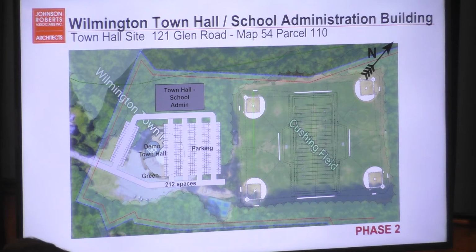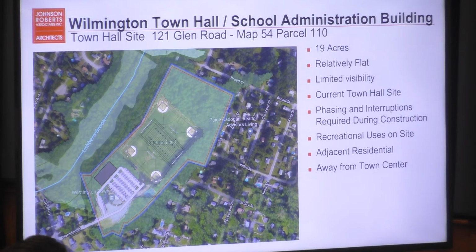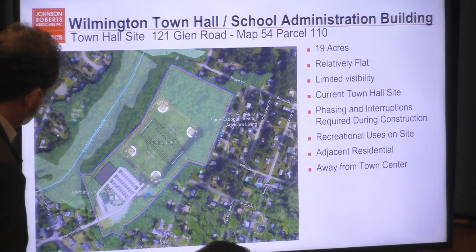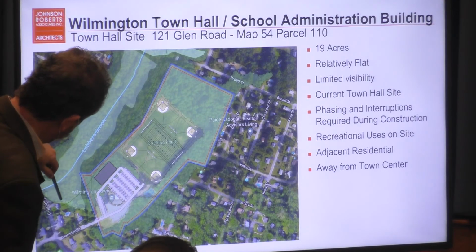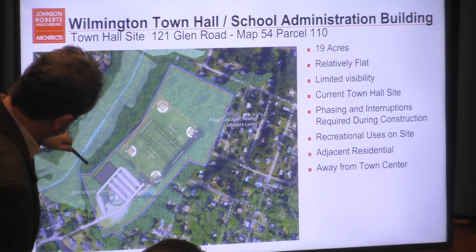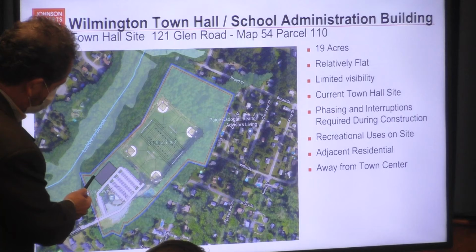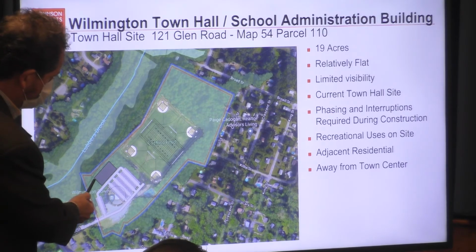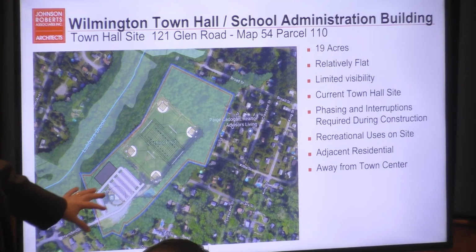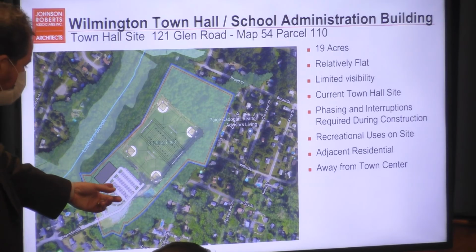There's a brook that runs along back there. Is that within the 100-foot buffer where the town hall would be? Well, you can see the brook back there. 100-foot inner riparian, 100-foot outer riparian. It's hard to see, I know, but the brook is there. Lover's Brook, right? We've got a 200-foot setback, which is this green line right here. And then we have a 100-foot setback from the edge of the wetlands. Again, this is from the GIS, and a survey may change this. We're away from the 200-foot and the 100-foot setback from the wetlands, with all the development we're doing. So we try to be conscious of that when we lay this thing out. We didn't take it all, but we're pretty close to the edge of the property in order to be able to get this to fit.